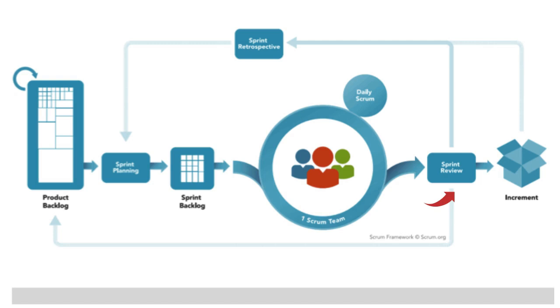I'm sure everyone agrees on the importance of continual improvement and adapting, so that's why the development team participates in a sprint retrospective as the last event of a sprint. That's where they improve themselves, the processes they use, as well as think of how they can make the product even better. So what happens next? Well, you go straight from one sprint to the next, and the cycle repeats itself. We'll be learning a lot more about all of these steps in much more detail.